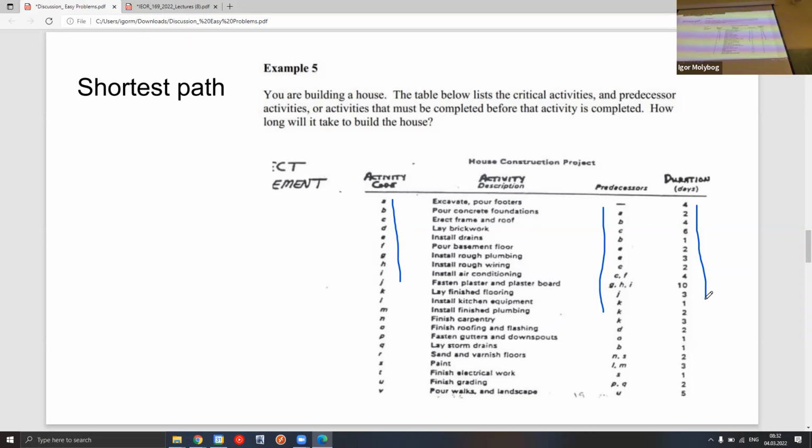But some of the nodes can be processed simultaneously. So what you are really interested in is a continuous path from S to T that is of the largest length. Or if you reformulate it, you can say that it's the shortest path if you are taking durations to be negative. Any questions regarding the high level idea?